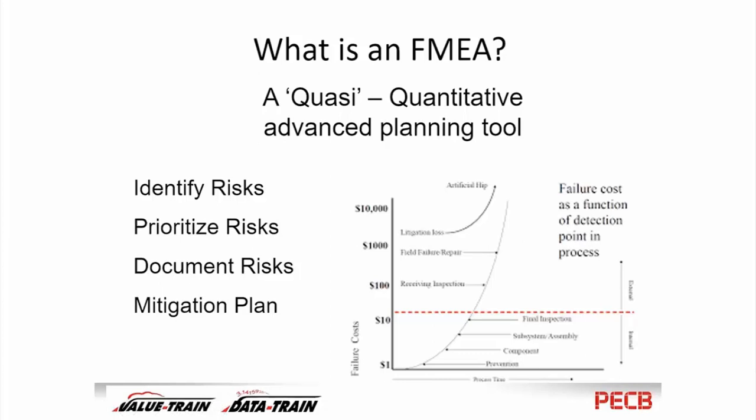little graph in the corner, but the sooner you're aware of a potential problem and fix it, the cheaper it is to fix. That's a very well-known fact, and especially when it comes to things like software, it's been quantified that if you can fix a potential problem in the concept stage, that's much cheaper than fixing it after you've made the product and shipped it to a few million people, like Microsoft and Apple do all the time, and like the car companies do.